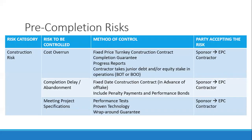A very significant pre-completion risk is construction risk. Everything can go wrong in construction, and it may make or break a project. If the plant is not completed, lenders will be in trouble because they have given the money with no other means to recoup it. That's why construction risk is very critical to banks — the biggest risk is if construction is not finished and they cannot get their money back.